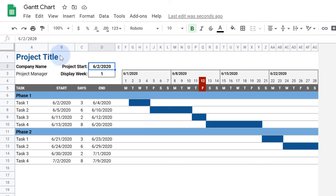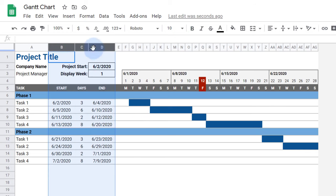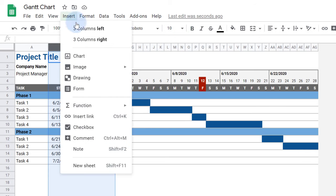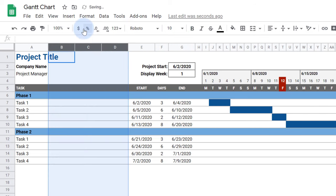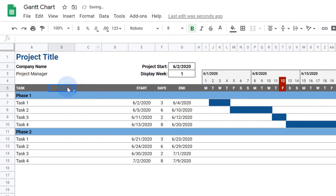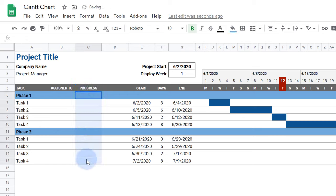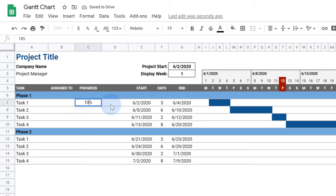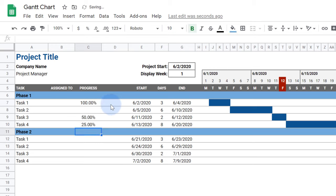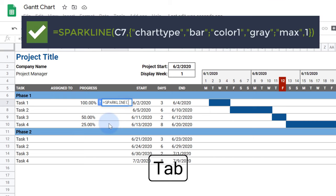First, I'm going to insert three new columns. This first new column is for who the task is assigned to. The next two columns are where we'll show the task progress. I'll change these cells to the percentage format, then I'll enter in some example data. In the next column, we'll create bars that represent these percentages. To do this, we'll use the Sparkline function.